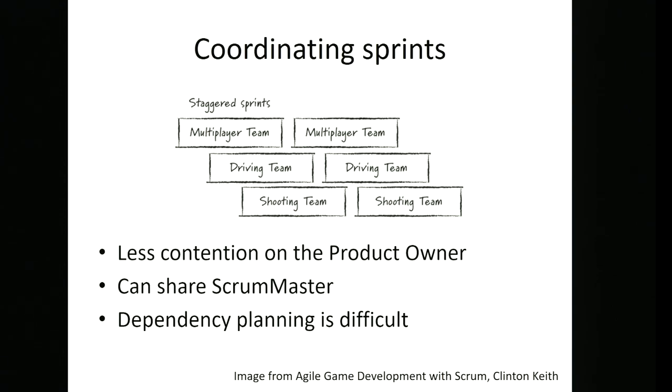And the planning is difficult, because the shooting team is planning after the driving team and the multiplayer team have already started. So there's a potential here that you get a one sprint lag on various things that need to be done coming through, which might be okay, but again, as with all these things, it requires some foresight.